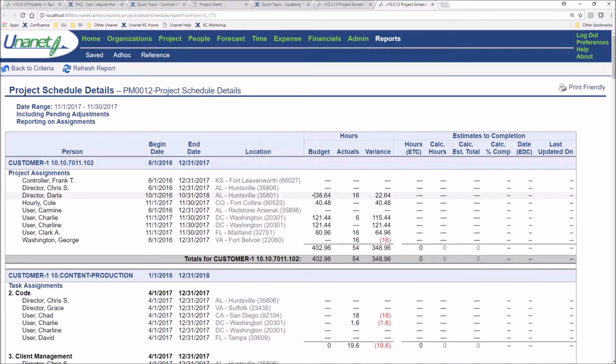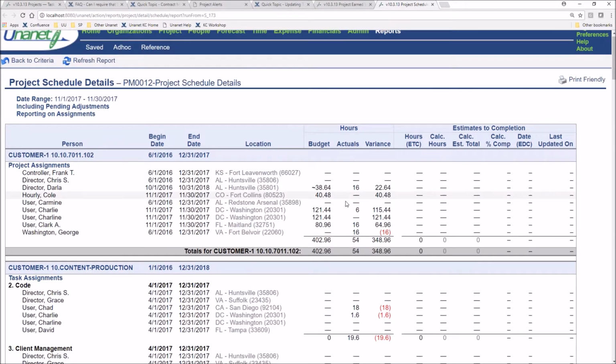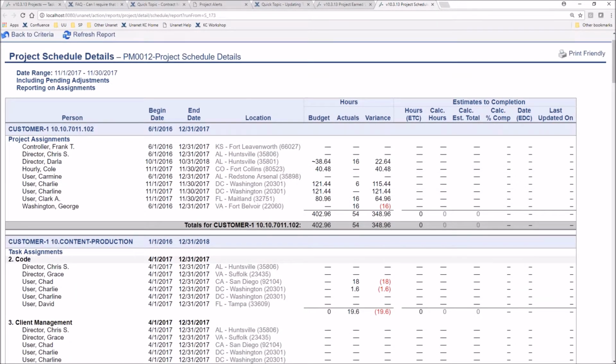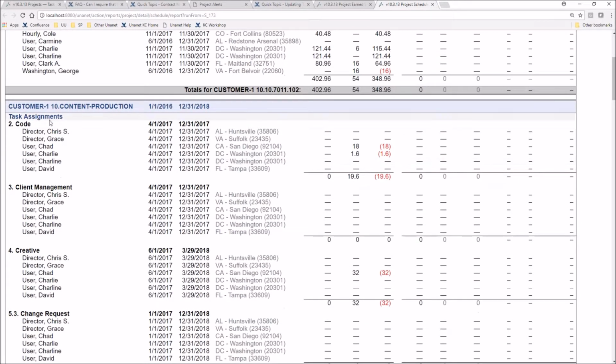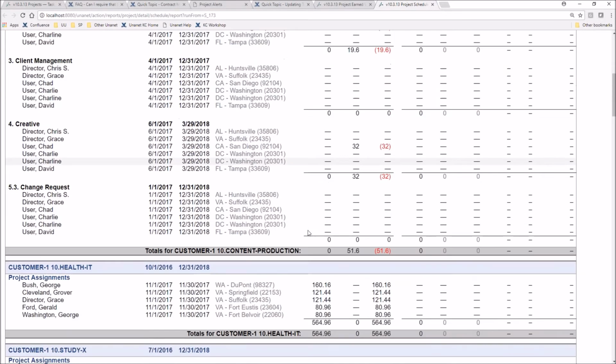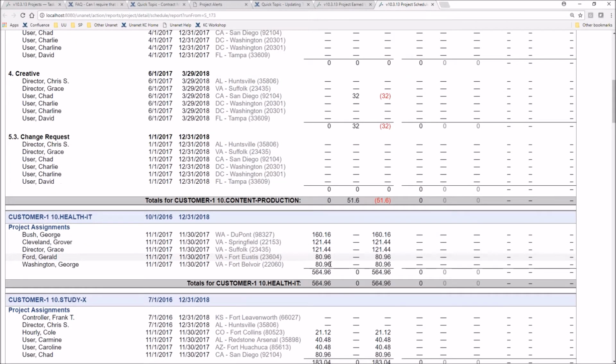This one that has an approximate budget number on that, then I probably have that individual in as an FTE, so I'm approximating how many hours it's going to be across that. If I have tasks on a project, then it's going to break that out for me at my task assignment level. So then I'm able to see on a task by task basis what my actuals and my budgets are, if I had budget numbers in there as well.